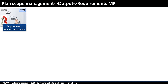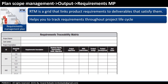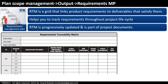What is RTM? The requirements traceability matrix (RTM) is a grid that links product requirements to the deliverables that satisfy them. Requirements descriptions are linked to business needs and project objectives, and may also contain the name of the stakeholder who provided that requirement. RTM helps the project manager and business analyst track requirements throughout the project lifecycle. RTM is progressively updated and is a part of project documents. For example, when a product is designed, requirements will be linked to design elements, or the RTM will be updated marking that requirements are already considered in the design.